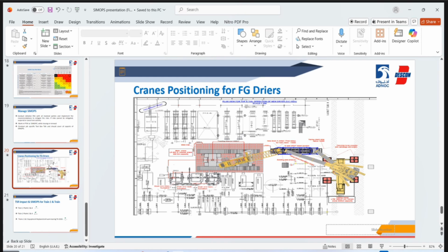You see, here we have got the tailing crane on the left-hand side. Then there is the SPMT in between. And this is the main crane, which is parked right inside the plant. Okay. So it will lift the dryer from here, pass over all the equipment and install them in this place. So this is just a brief overview of the scope of work.